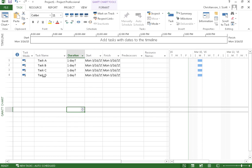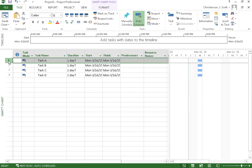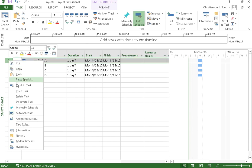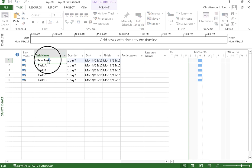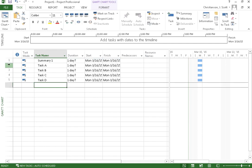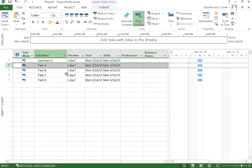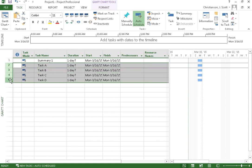Now, when we have a project that's fairly large, we may have hundreds or thousands of tasks in our project. So what we might want to do is create different summary and sub-summary tasks in order to keep track of all our various tasks in our project. I'm going to insert a task above task A here. And I will just call this summary 1. And in order to get all these tasks summarized by this particular summary task, what I do is I select the tasks I want to have come underneath this summary.